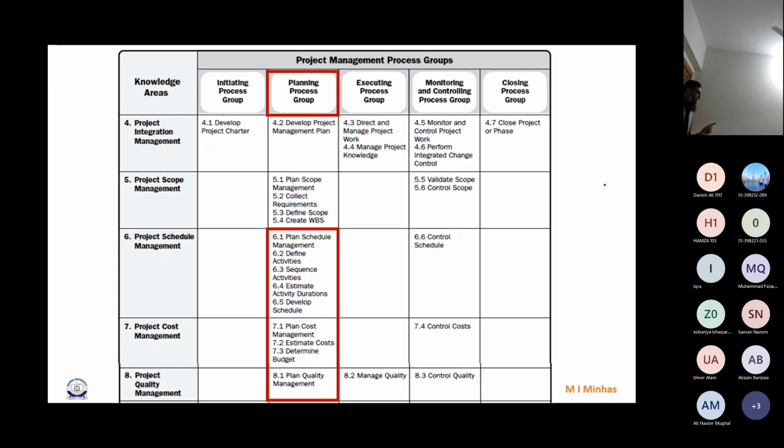Right? Yes. So when we are in the control procurement process, what do we do? We go or we call the customer, we check their deliverable. Actually, at that time, we are in the control procurement process, and that organization is in the validate scope.